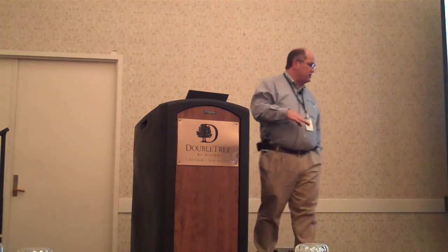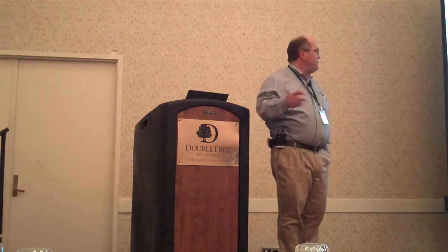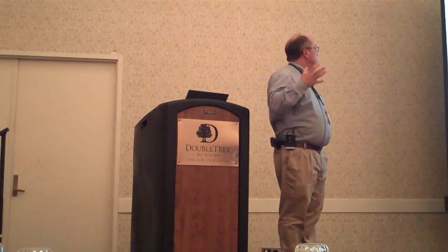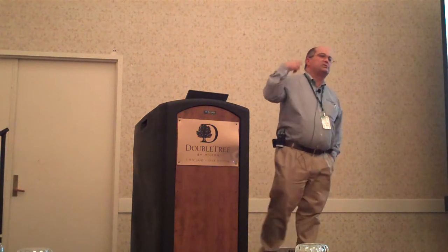Another lesson learned, we tried playing with 2-week sprints, 45-day sprints, 30-day sprints. That drove the team nuts. They didn't know what day they were supposed to do the planning meeting or the backlog review. So stabilizing the sprint cycle, 30 days, always, on week 3 we're doing this, on week 1 we're doing this. It made it a pattern for the team to help follow and become very productive.